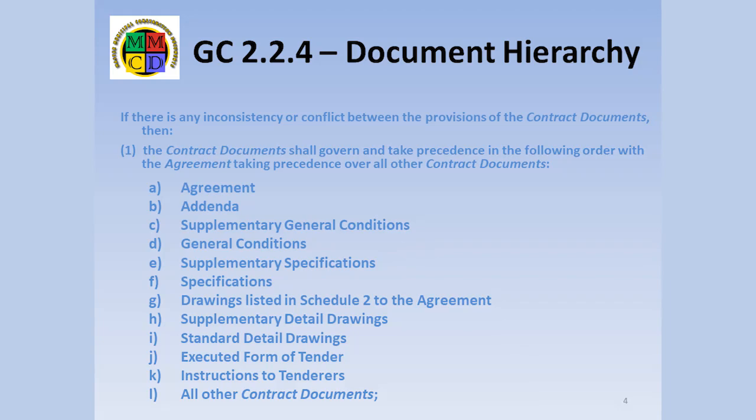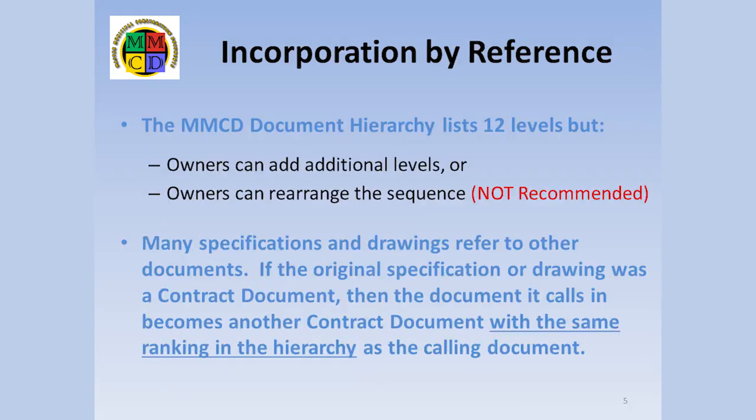Tender document preparers, owners, contract administrators, and contractors, including their superintendents, must know this hierarchy, or at least that it exists and where to find it. As with all general conditions, owners have the ability to modify this clause to change the order or add or delete items. With one exception that I'll discuss later, the Association does not recommend modifying the standard document hierarchy.